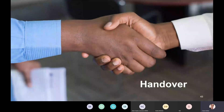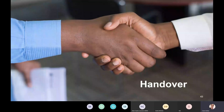The handover plan covers handing over not just a product but also the management, optimisation, and reporting of benefits. If business as usual is involved from the beginning, the management plan should have included the resources they'll need so it doesn't come as a shock. So we have covered the strategic outline case — permission to investigate options; the outline business case — these are the options and a recommendation to go to tender; and the full business case — confirmation that a supplier can provide the preferred option with the benefits needed, at an affordable level of cost and risk.